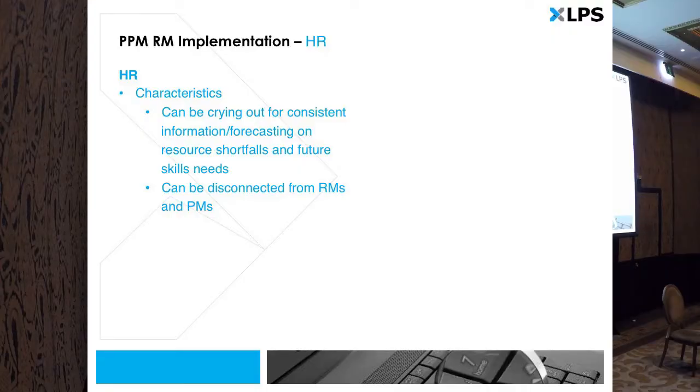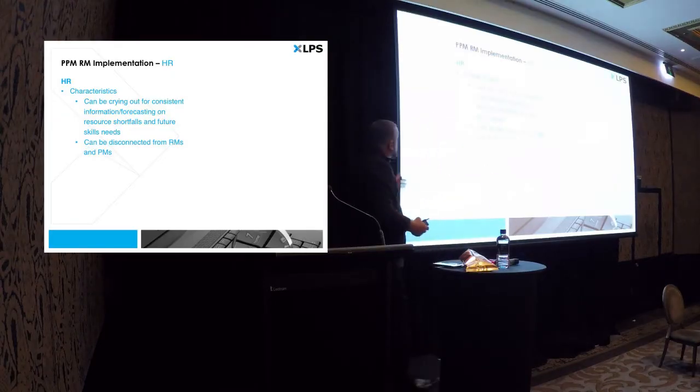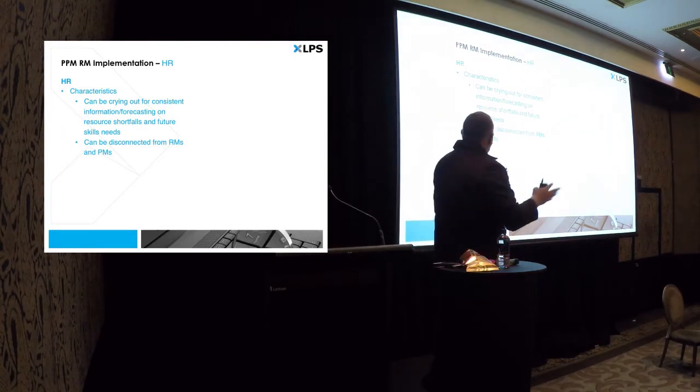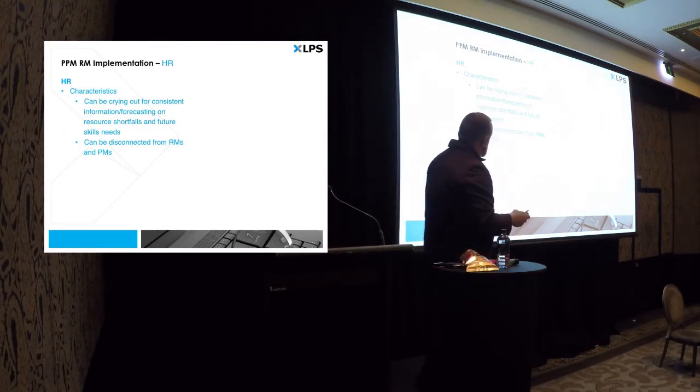So we've had to develop a resource management system that allows us to track 10, 15 years out into the future, which is a lot longer than most projects, to then figure out from an HR perspective what we need to be doing now to start fulfilling the right resource needs 5, 10 years into the future. So in our organisation, the data that comes out of the resource management component of an EPM tool is really vital.